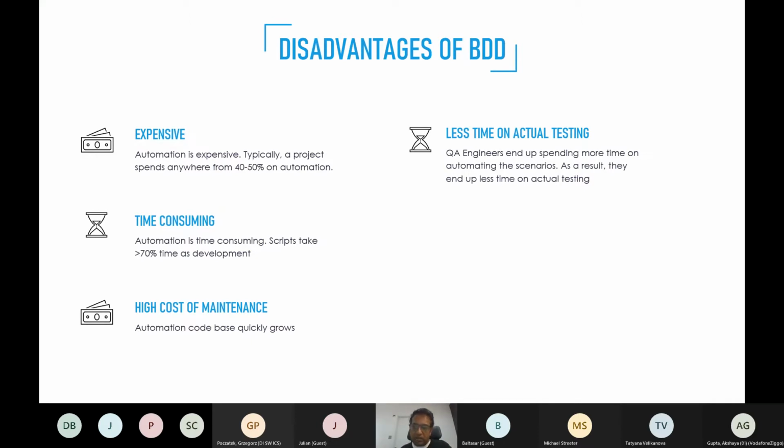For an example, if the QA engineer is given, let's say, 7 days to test a bunch of BDD scenarios. Let's say in their head they thought, okay, I'm going to take about 3 or 4 days to automate, and then the rest of the days I'm going to use that automation to test it properly and also do some edge case testing. When they code, it gets extended and extended. So let's say they spend another day or two on additional work because of some coding issues. Now that window for testing has narrowed. So as a result, they've compromised something on the testing.